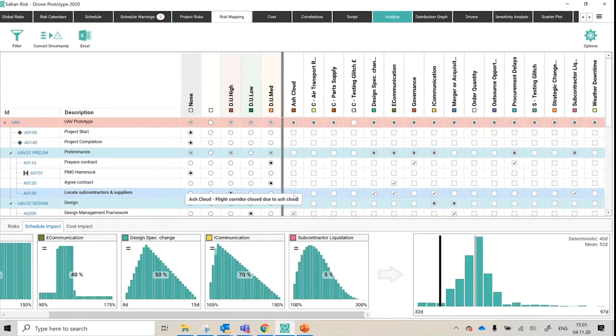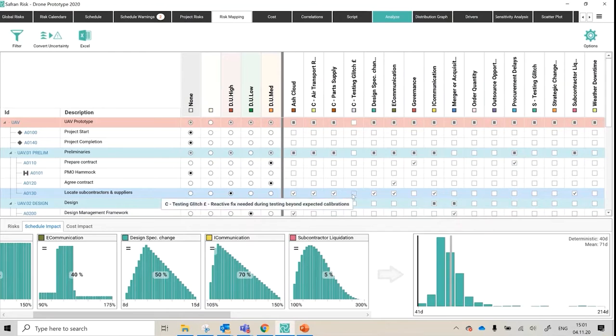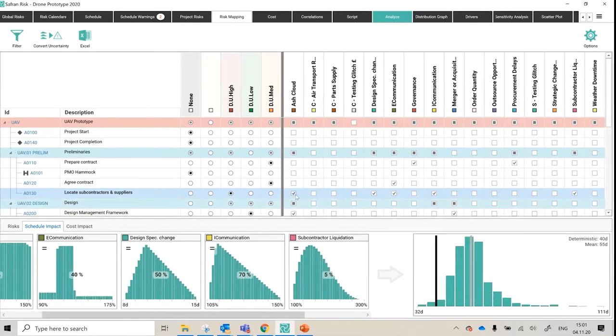Here's the power: as I start adding new risks, you can see in real time that it reruns 1000 iterations instantly. And then you can see that that's changed the shape. Well, maybe not so much the shape, but it's extended the worst case, and the minimum, the best kind of outcome, has also been truncated somewhat as well. So you get that real sense with your team of how the way we are building the model is really having an effect, and you get that kind of instantaneous feedback.